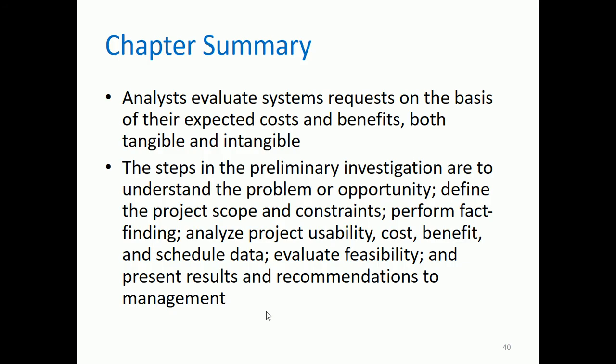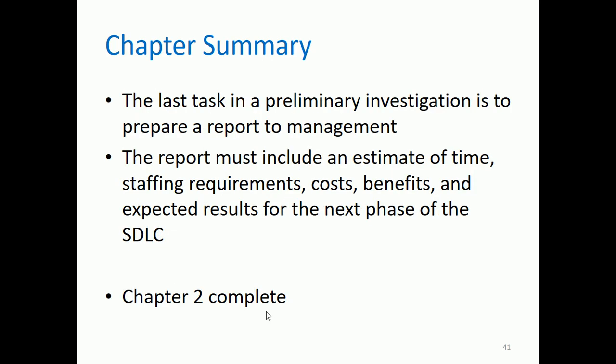So the steps in the preliminary investigation are to understand the problem or opportunity, define the project scope and constraints, perform fact-finding, analyze project usability, cost, benefit, and schedule data, evaluate feasibility, and present results and recommendations to management. And the last task in a preliminary investigation is to prepare a report to management. The report must include an estimate of time, staffing requirements, costs, benefits, and expected results for the next phase of the SDLC. Okay, so we're already finished with chapter 2.